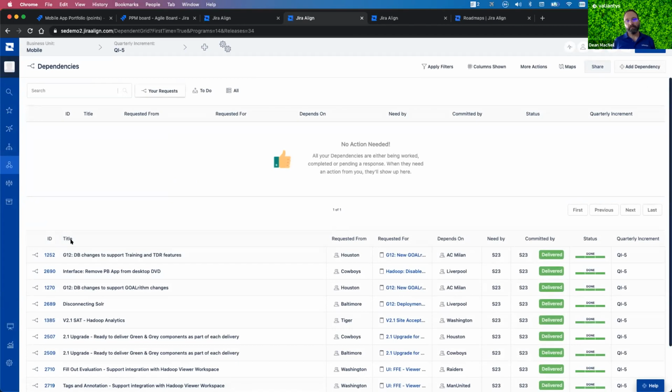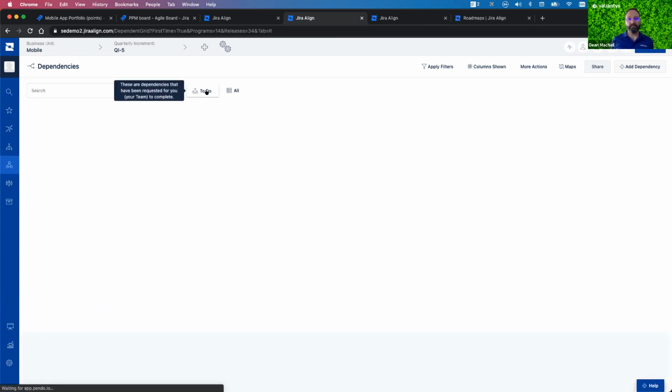Jira software. Dependencies in Jira Align are completely different in the sense that they are actual objects that have a workflow and that are tracked, and they are agreements between teams on specific things that need to be delivered by a specific date, right? Specific items of work. So you can manage those different agreements, and you can see here I have a list of delivered items. These are all the requests that I made to other teams to manage those specific dependencies.